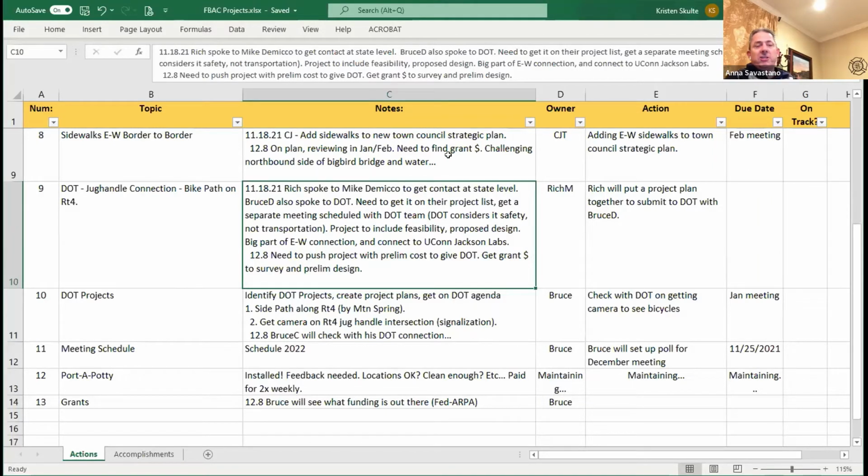I would say it's our job to push these projects through and say that this is what we'd like to do. And then the town makes the decision of where these grants are, what projects they're going to focus on as part of the capital improvement project. From there, once it becomes a project, we then decide, do we have the manpower to do some surveying, which we probably could do some of, and then depending on how the workload is for that year, can we do this in-house, or do we need to have this done outside? So that's kind of where that all falls through. Each project is totally different in terms of how large, how much involvement it's going to be. Like I said, we don't do traffic signaling projects. So the more difficult it gets into something like that, then we may just kick it out to a consultant.